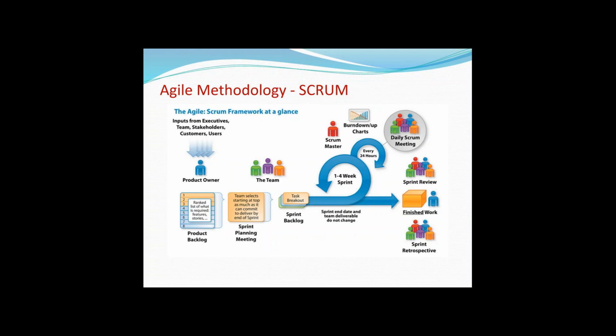Once the quality analyst team says that there are certain bugs, the developer will again take the code, fix the bug, and release it again, which means the QA tests it again. If everything is good, within the 2 weeks the quality analyst team and the developers team will make sure that whatever user stories they have picked up will be completed. And on the last day of the sprint, the 2 week sprint, the product owner will review.